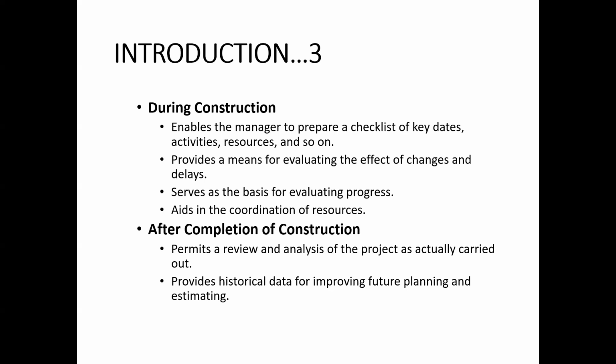then incorporating those changes becomes relatively easier and more systematic. The planning and scheduling serves as the basis for evaluating progress. So, progress evaluation. It is obvious, for example, that if we have already established a plan before the construction, we have a baseline already established. Later on, when the construction has taken place, a normal construction project, for example a building, normally takes like 1 year, 2 years, which is an appreciable duration.